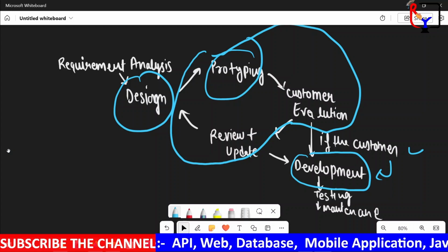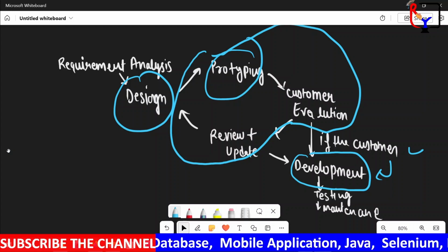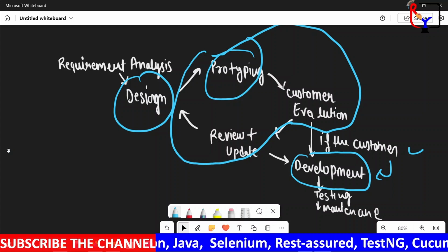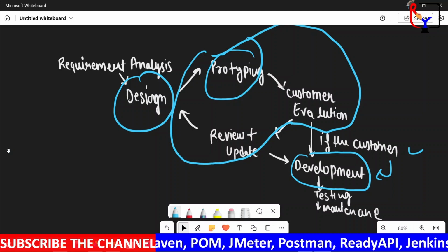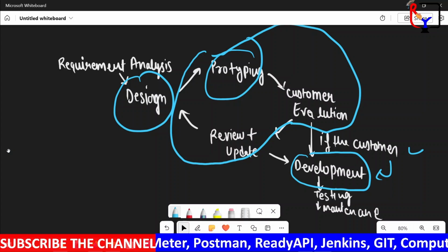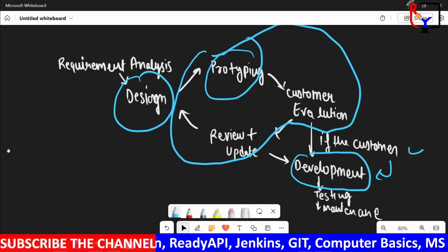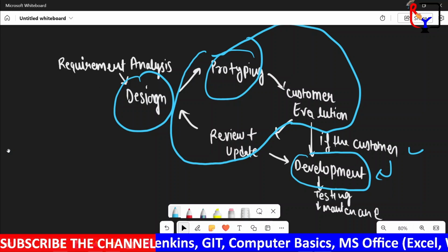If the customer changes their mind frequently or makes impossible requests, this time developing the prototype can quickly compound. For this reason, it is best to place a cap on the number of iterations allowed before the prototype must be accepted.